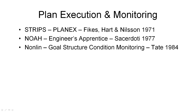Nonlin maintained the goal structure or rationale behind plan elements and could use this as the basis for plan execution monitoring, to spot significant divergences between the required outcomes and activity, and their later uses to satisfy constraints in the plan. In some cases, alternative contributors to satisfy those required constraints could be found in the existing plan without changing it. In other cases, problems could be spotted well in advance and suitable changes made before the problem became critical.